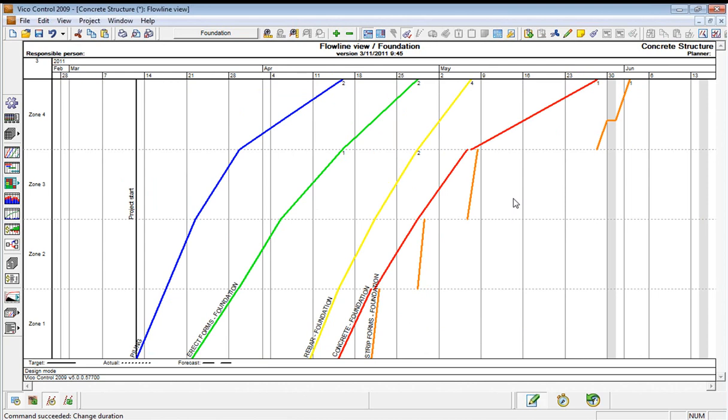So I'm having one group of workers up to this point, and then I need two in order to have a bit more of a harmonious schedule. We can do a lot more to this. I don't want to spend lots of time on optimization, but essentially to provide you the view that this is giving us and the opportunity to optimize.